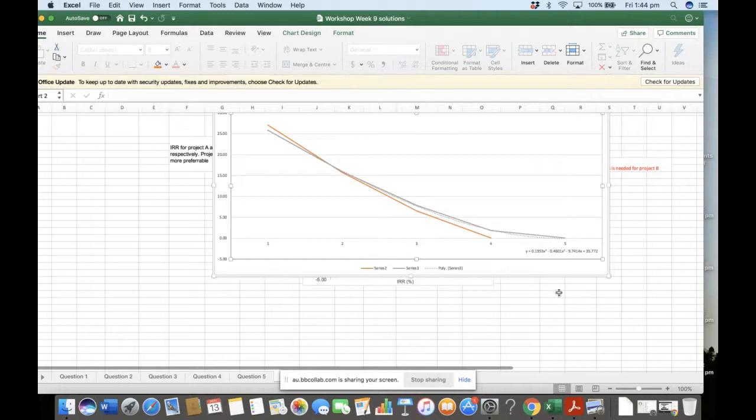Yeah, so if you see here, y should be equal to 0, which is the net present value. And by doing this, if you don't know the exact IRR, you can put the values in this equation. So your y should be equal to 0, and then you can find the value of x by using this. Or you can also use Victor's way of just trial and error between those two discount rates where your net present value is going from positive to negative.